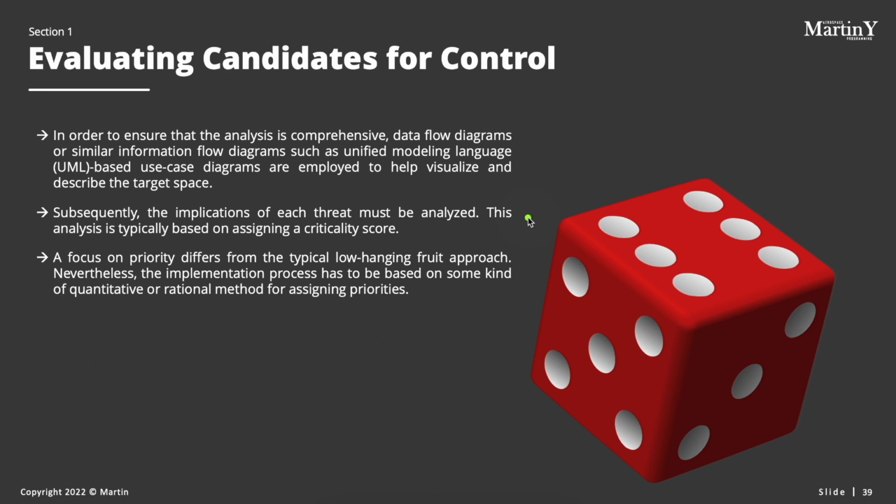because it allows analyses that are performed by analyst employees to classify each identified threat in terms of likelihood and potential harm. The classification can lead to priority ordering of known threats from most dangerous to least dangerous. This ordering will allow the management to concentrate resources on the threats that have the greatest potential of harm. It will also let managers assign fewer resources to lower priority threats. So this classification process would allow managers to build logical, in-depth schemes.